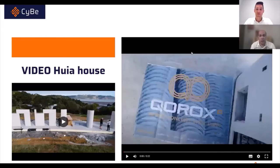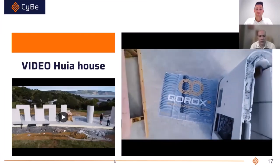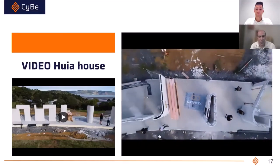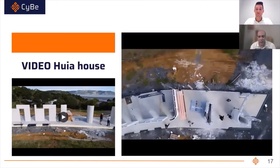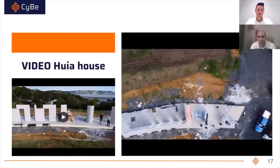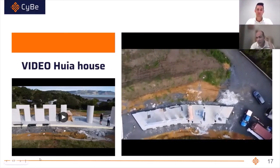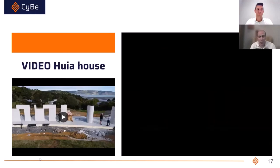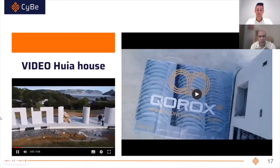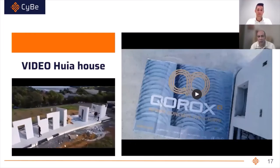So, last year there was a segment about us on the TV, and the client saw it, and they walked in and said, "I want to make my house using this." We went with the architect, and he was happy with our system, and then we did an amendment to the building permit, and the Auckland Council was very happy with all of the testing and all of the procedures that we have done. Because of that, the approval came very quickly.